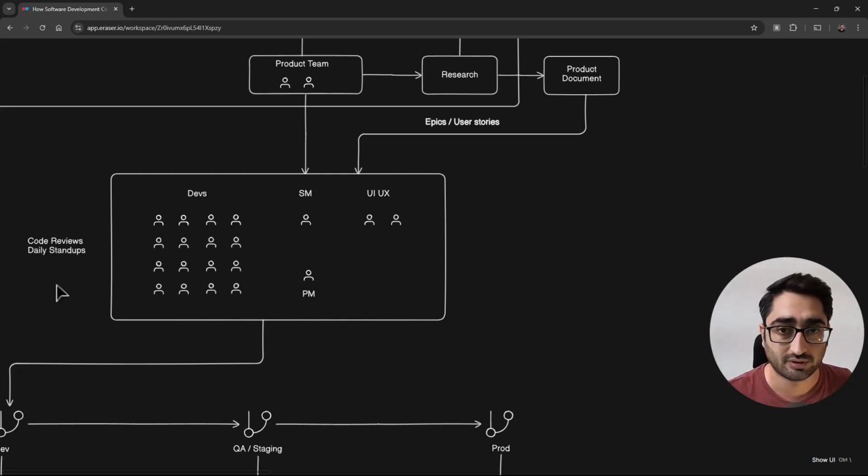For example, if another developer, my colleague, says that, hey, I did this yesterday, today I plan to do this, and there is one blocker. I need him to write the code first, so there is some dependency he mentioned. So you will know that, hey, this person is dependent on my work, so I need to finish it faster. So these dependencies generally get cleared in such meetings, and they are very, very helpful. It keeps everyone in sync, and they are the best.